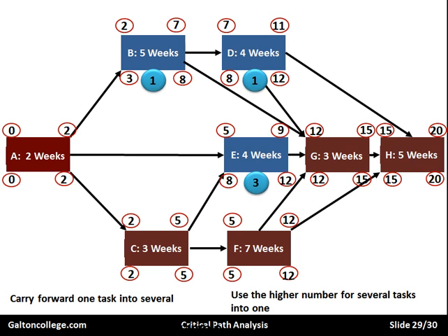That's all we really need to do on the calculation of critical path. Practice it, look at the numbers, and remember the two rules. Largest on the top, smallest coming back on the left. The backward move, smallest. The forward move, largest.